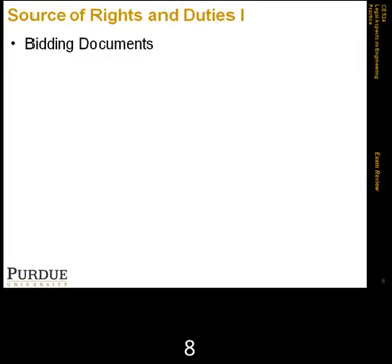And then we also had the documents generated during the bidding process, including the plans, specifications, general and supplementary conditions, addenda, agreement forms, and so on. We started talking about the basic agreement, which is similar to AIA A101. It's a small document whose function is to identify parties.